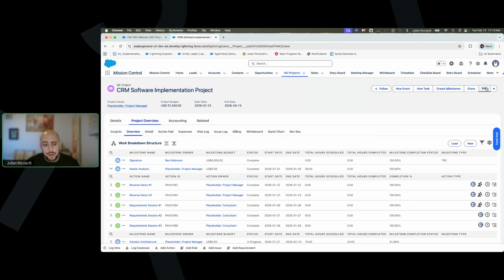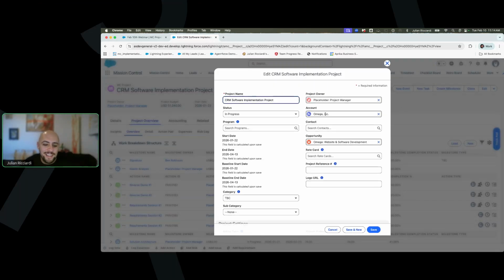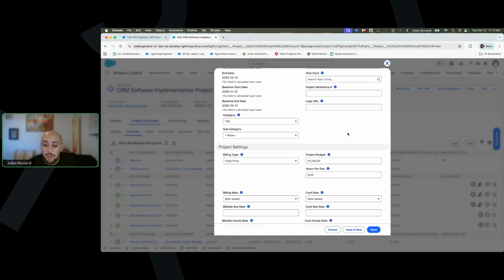And lastly, before I start showing you other assets that are part of our suite, in terms of the actual project structure, how do we bill the project? How do we make money, essentially? Why are we all here? So the thing is, we allow for multiple billing types. I've been in Mission Control for around 2 years now. I've yet to come across a billing type that we were not able to manage or that required any level of custom configuration. In terms of billing types, we allow for fixed price, expenses, time and material, controlled on milestones, deposit to T&M, and retainer to T&M.